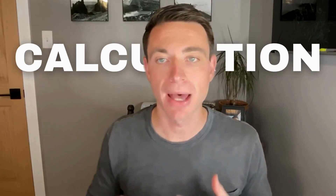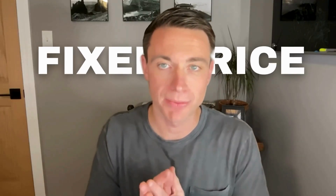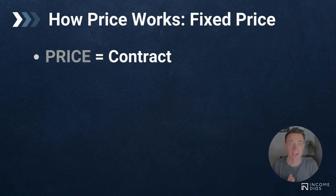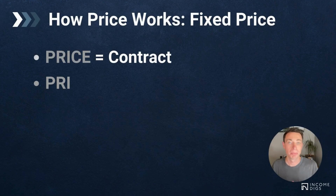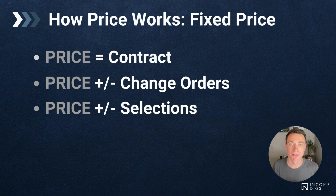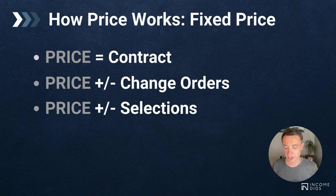The calculation for a fixed price contract is pretty easy. It's your contract price — something decided ahead of time — plus or minus change orders, plus or minus selections. Buildertrend does an amazing job of putting these items in their proper buckets and giving you this calculation for a fixed price project, and they always have.